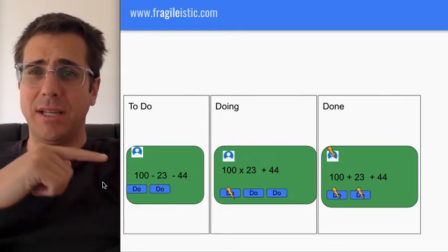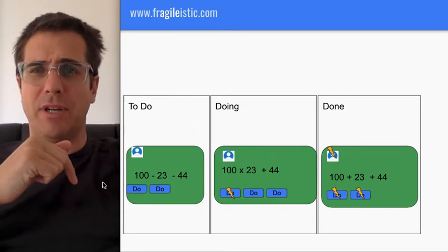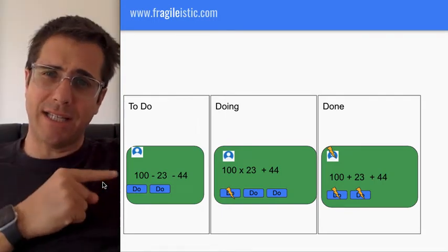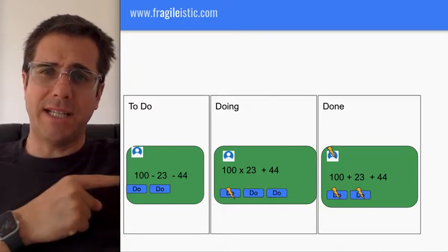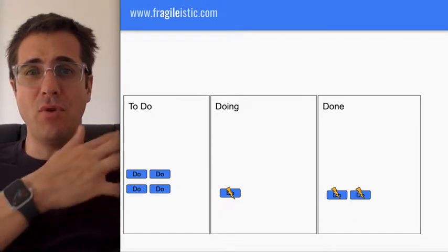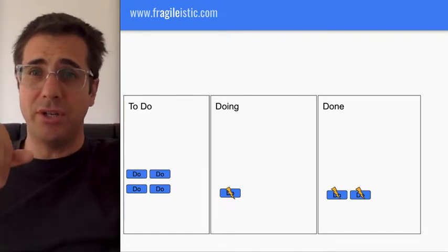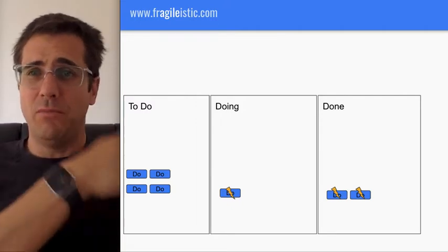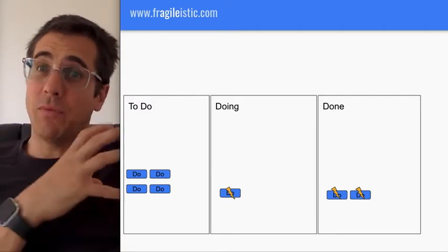Now, wouldn't it be nice, because we know we've got 3 things in progress, but actually there's more than 3 people on the team and they're all doing these tasks. It is nice to actually see these tasks below on a Kanban board. So these tasks below could also be visualized on a Kanban board. So if we just remove those things, move all the ones that aren't done into doing, we're doing this one task, guys. Let's all make sure we get this task done. Move it to done. That's also a Kanban board. We'll show you that in one of the tools.